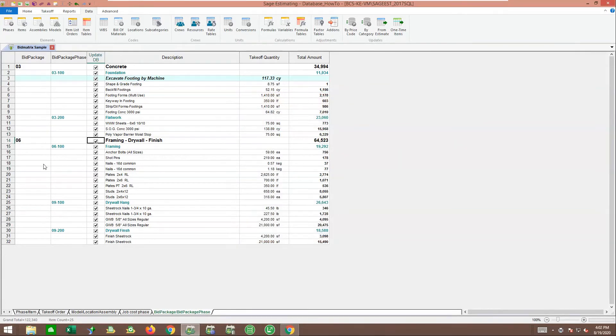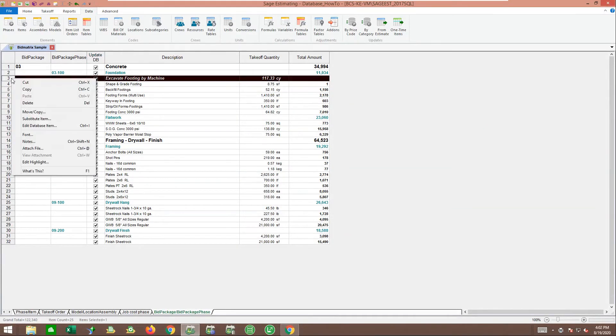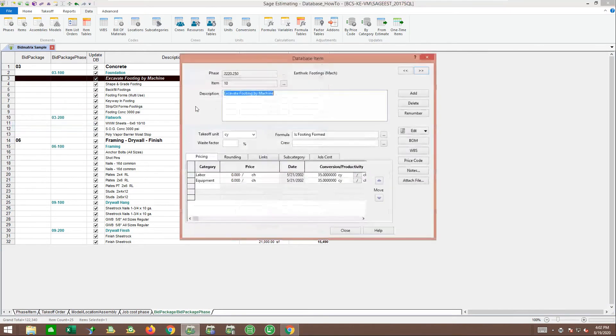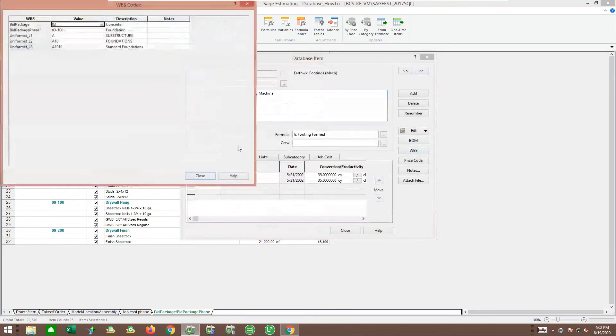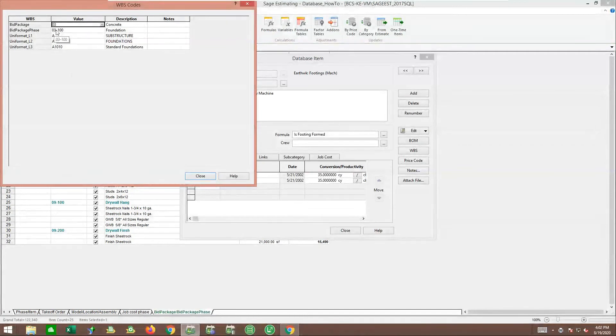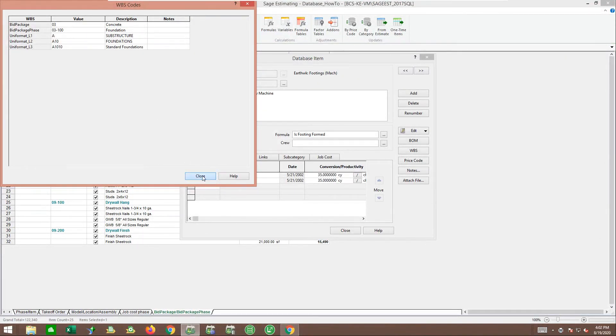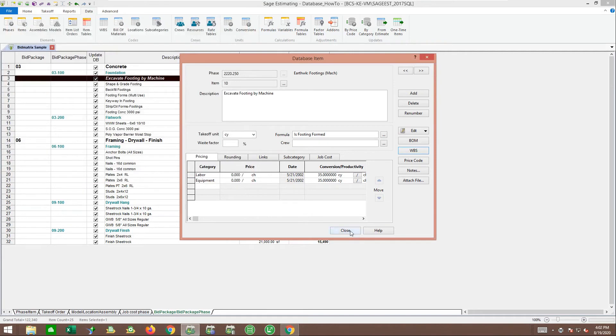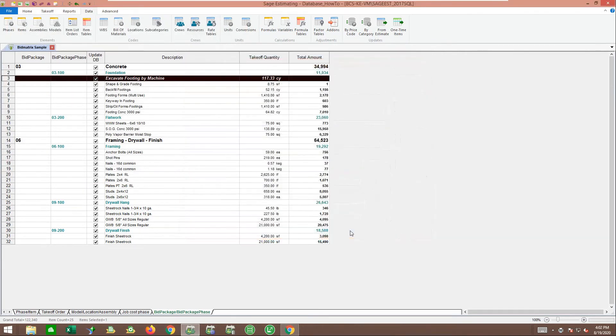Now if I take a look at my database, that has gone through and put this estimate's values in automatically. It's already got my bid package and bid phase that was blank a moment ago, but it took the work I did on this estimate and pushed that back to the database. So future estimates, these items would already be coded.